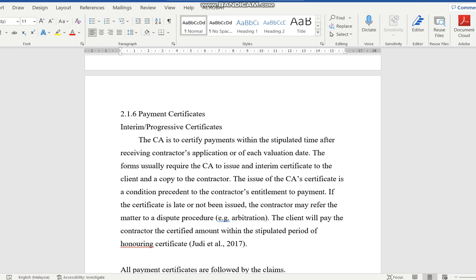Contingency sum is different from retention because contingency sum, it is emergency money, but the client consciously puts it there. They put a sum there, an amount, and they call it contingency, and you may not use it. So your contract sum is contract sum plus contingency. That is the final contract sum. But when you don't use the contingency, you don't use it. So in what circumstances do you use contingency?